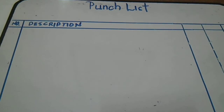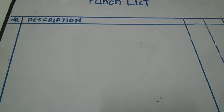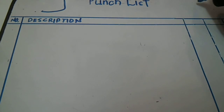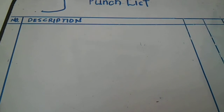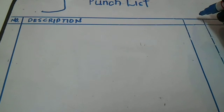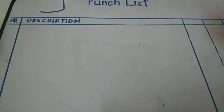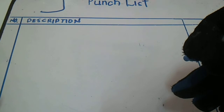Here is the example of my punch list. I will make a punch list from my comments in my isometric drawing. So the form has a number and description. On the left and right side you have the subcontractor and main contractor logo, and here you have a description and what category — A or B. There is a legend at the bottom for piping, mechanical, civil, and electrical.